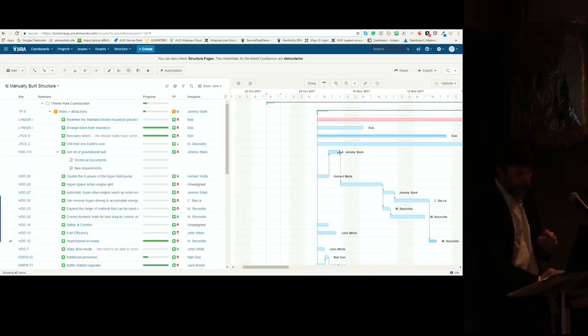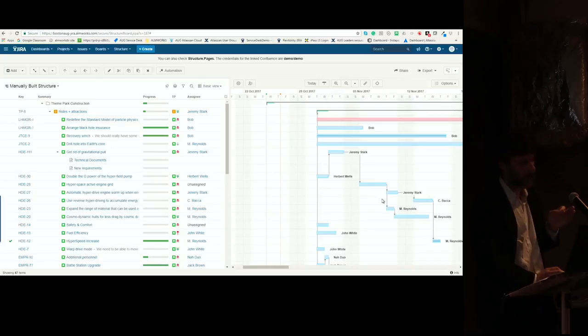When you're changing the duration of a specific task, Gantt charts will do things that you would expect. For example, if I extend my task out to the end of a week and there are dependent tasks, it will start those tasks at the beginning of the next week. It knows to skip weekends. This is actually configurable. How your organization treats weekends, days off, lunch hours, and so forth is all configurable here. And based on how you move tasks around, it'll automatically align accordingly to what you specify.